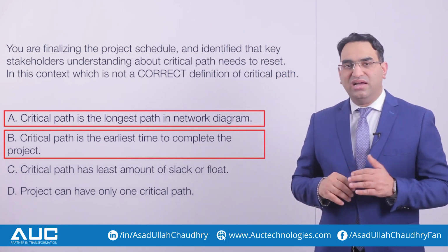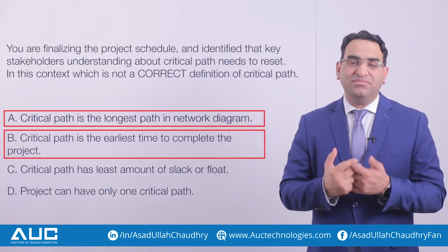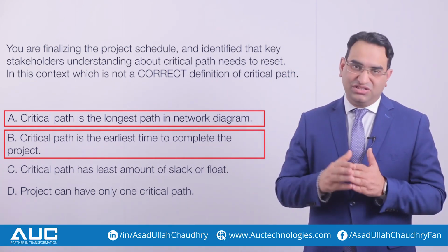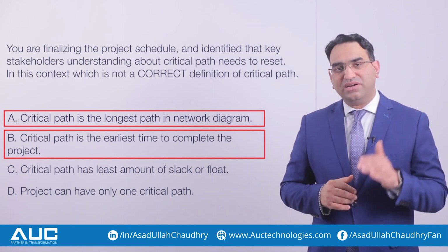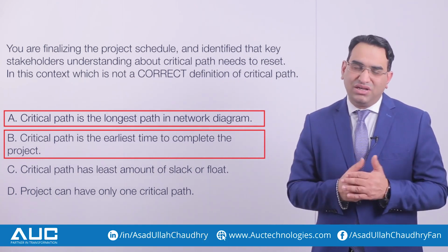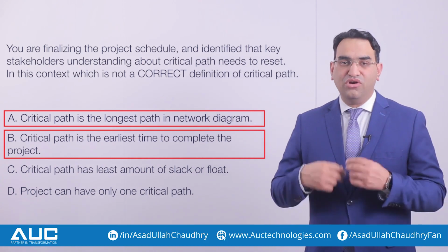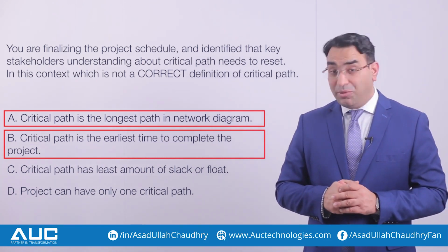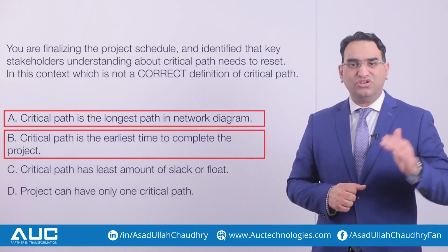Here slack or float means the time that we get automatically by having the dependencies. So whenever we talk about critical path, traditionally it doesn't have any float or slack. So this is also the right component of a definition. Again, it is not the answer.